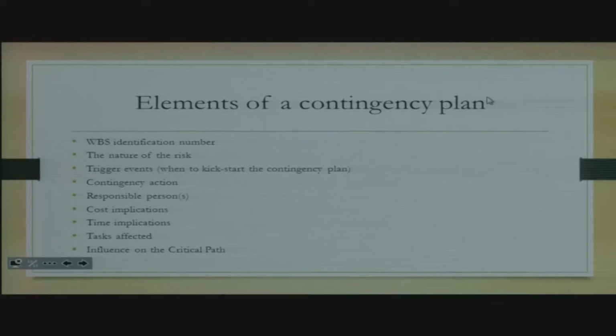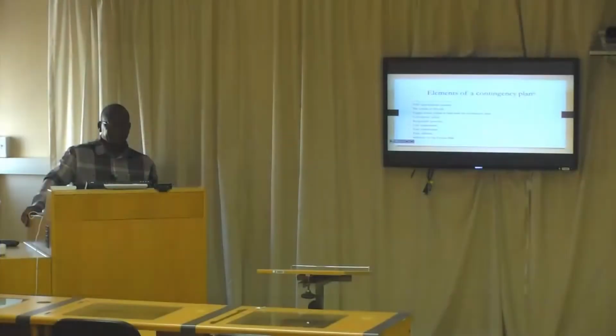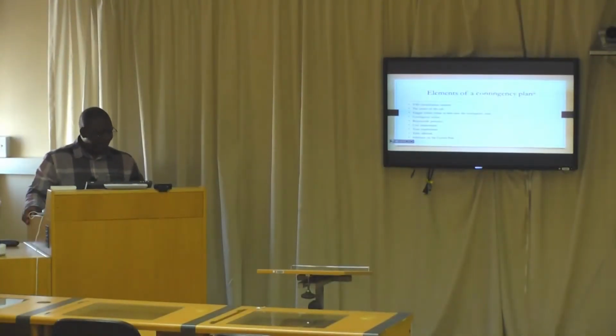With the example of the late or delayed delivery of bricks, the trigger event would be if by the preceding day, by 2, the bricks are not delivered, then you need to kick in the contingency plan.